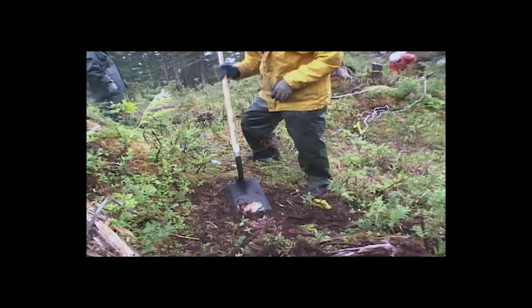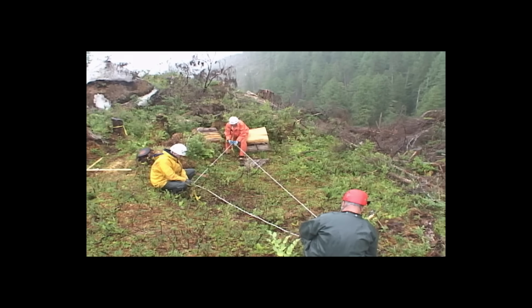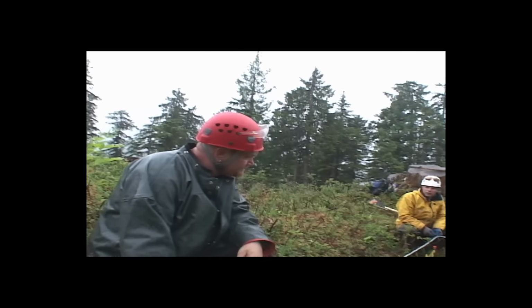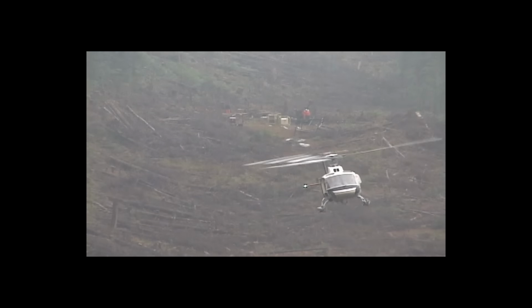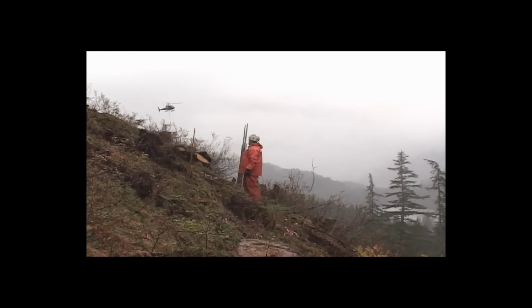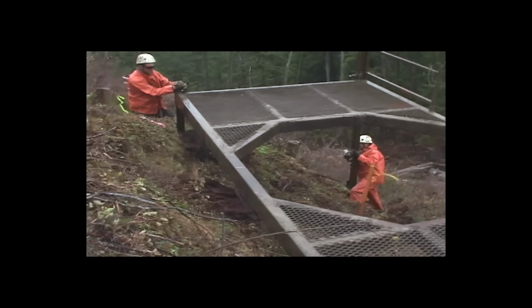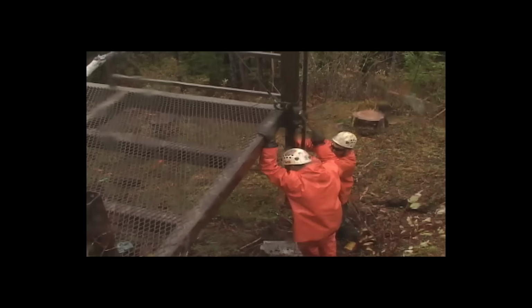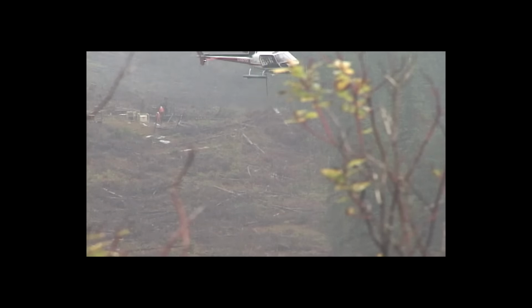They begin by hand clearing the site in order to clear a place for the drilling deck and, of course, remeasure and justify all of the drilling marks. Accuracy here is measured in inches. When they're finished prepping the site, the first A-Star medium lift helicopter arrives, carrying the bare drilling deck, which is lowered and placed exactly on the marks that the crew has fixed. The deck has adjustable legs for horizontal and vertical leveling.